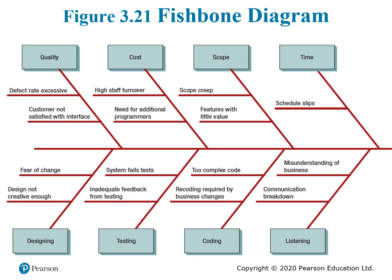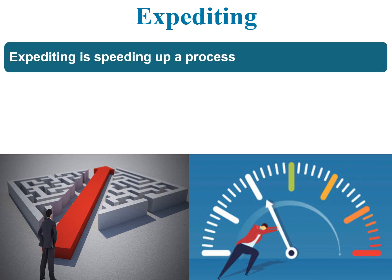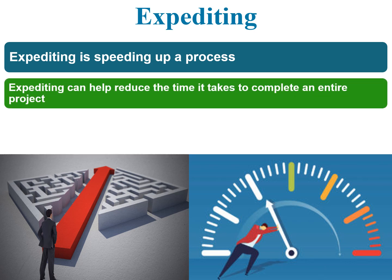Figure 3.21 shows another fishbone diagram example. In terms of quality, issues include defect rate, excessive customer dissatisfaction with the interface. In terms of cost, issues include high staff turnover and the need for additional programmers. These causes drive project risk effects. Another project management concept is expediting — speeding up the process without affecting quality of the outcome. Expediting can help reduce the time it takes to complete an entire project, and expedited activities must be on the critical path.